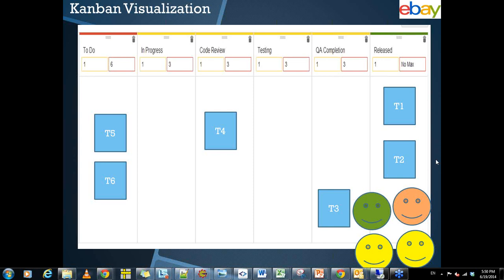Okay, the next question I have is, should beginners apply the Kanban approach or the Scrum approach? Which approach will be beneficial? The approach that you select does not depend on whether you're a beginner or not. It depends on what your product requires. If you are working on a product in which you can plan ahead what needs to happen when, and you can work in iterations where you see an actual output at the end of every iteration and you can release at the end of every iteration, Scrum would suit. If you want to release independent of iterations and you have a project with a lot of changes coming in, then Kanban would help.